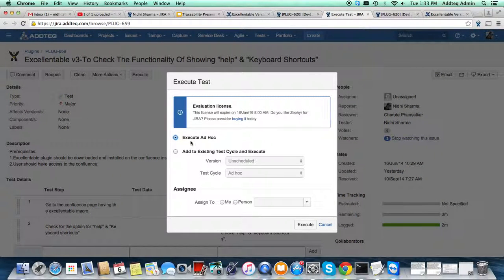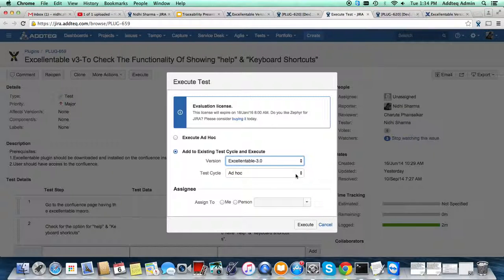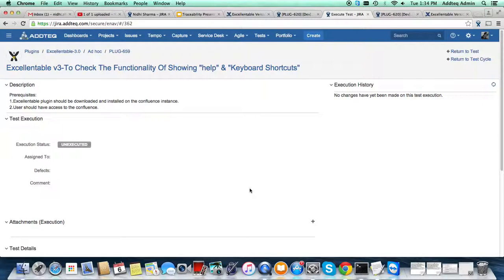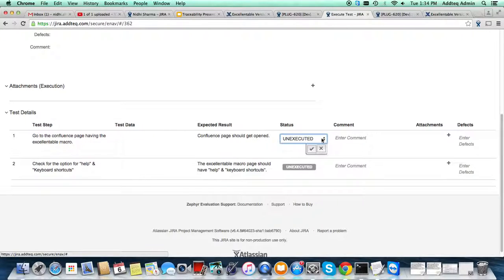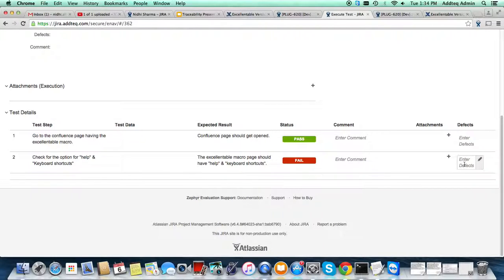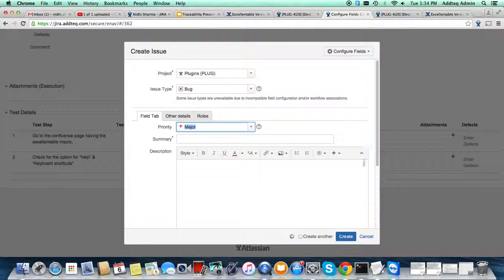To execute test cases, just click on Execute. It will ask how you want to execute — ad hoc or adding it to an existing test cycle. Clicking Execute takes us to the execution page of the ticket. Suppose this particular test case passes — I'll mark it as pass. If a test case fails, the tester will create a new issue, a new bug, for that failure. The bug will be raised within this project, and again from Zephyr we get back to Jira.